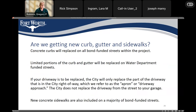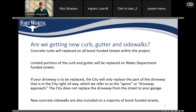Here's information regarding above-ground improvements on bond-funded streets. All curbs will be replaced, and limited portions of curb will be replaced on water department funded streets. If your driveway is going to be replaced, the city will only replace the part of the driveway in the city's right of way — referred to as the apron or driveway approach. The city does not replace the driveway from the street all the way to your garage. New concrete sidewalks are also expected on a majority of bond-funded streets.